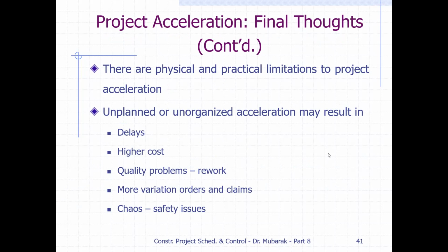Unplanned or unorganized acceleration may result in delays. So if we create a mess, even though we want to shorten, it will create delay, or it will increase the cost. Okay, or there will be a quality problem if we do not maintain the proper quality, just putting more importance on speeding up the project. We may do wrong work or do it in the wrong way. So we have to dismantle, we have to do the rework. So avoid these things whenever you shorten or reduce the duration. We have to maintain the quality, and there should not be a rework problem, or we have to dismantle and do the work again.